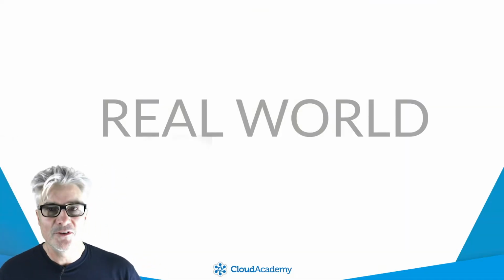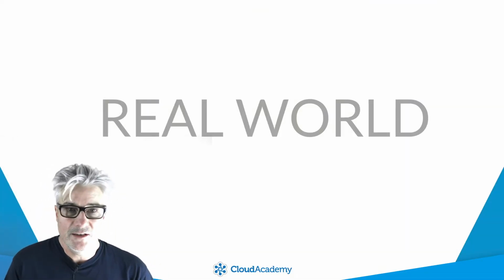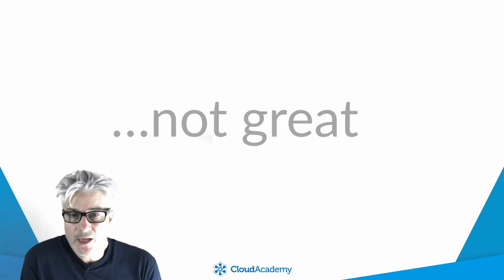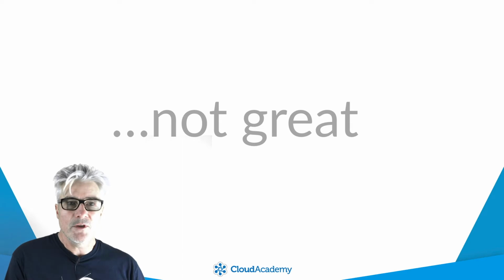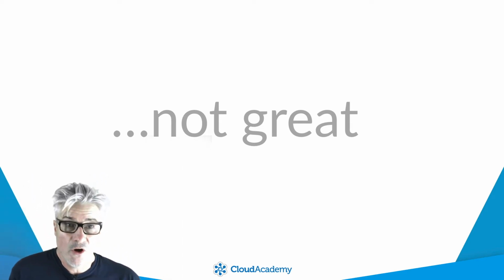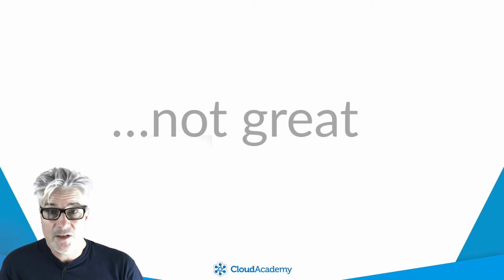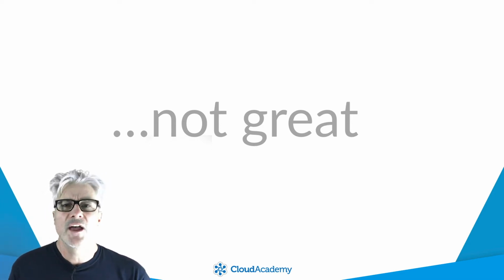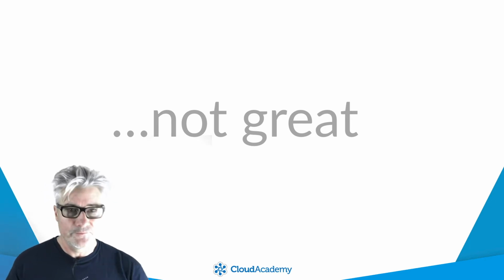Pretty soon into the development, the customer would realize they needed something not described in that functional specification. The customer would create a change request. We would document the change request, estimate the work required to fix it, propose a change cost if it was required, and ask the customer to accept that proposed change. Now this process would happen over and over. It was slow and painful.